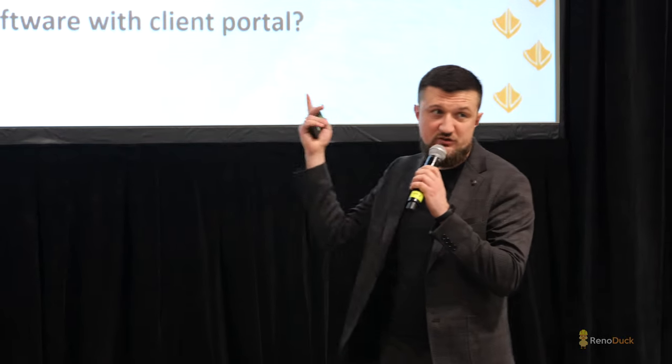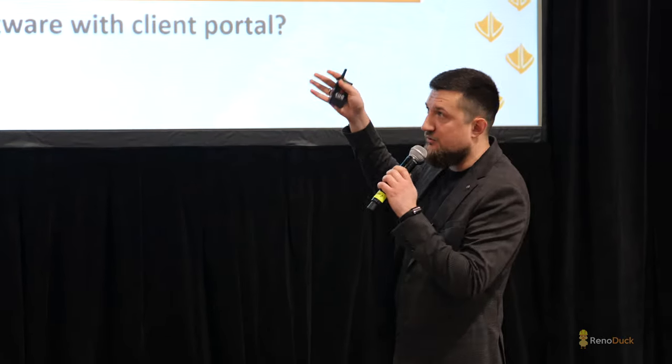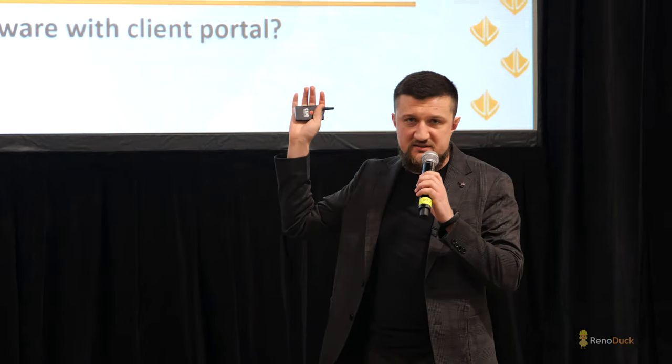If you want pot lights, you need 4 pot lights, so that's 8, and you'll need a switch, so that's 9 versus 3. And if every pot light or switch or plug costs $100 a pop, you're looking at a $900 difference right there.